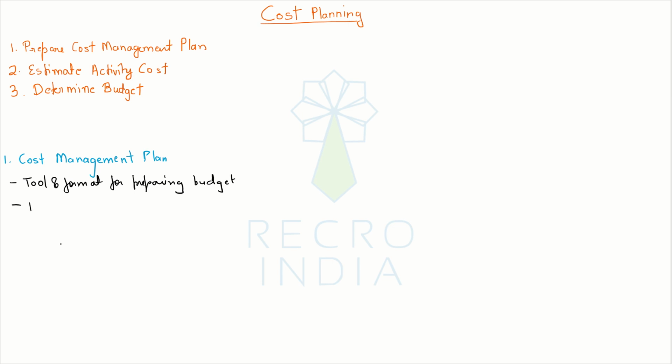Then what will be the units of cost, like INR or USD or euro, whatever. Then what is the allowed variance, say for example plus minus 10%.